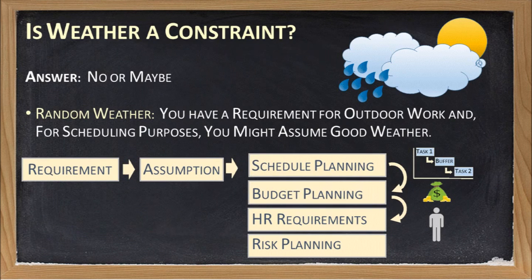Students often ask me if weather is a constraint. For the most part, I don't consider it to be a constraint as it has too much of a variable nature about it. Constraints should be fixed.